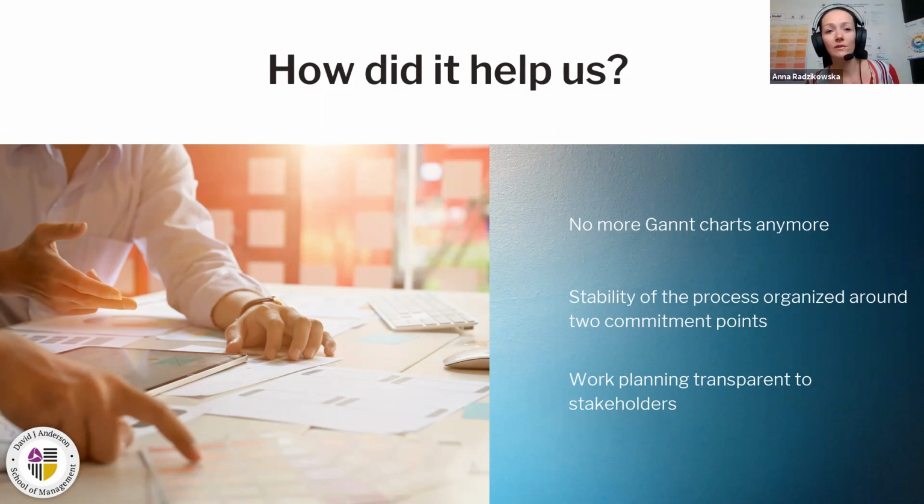For us, it was also difficult, not only because we had so many unusual circumstances at the beginning, but also because in our organization there was a deployment calendar. So we couldn't just deploy. We had a deployment window every second Saturday. And if we missed this deployment window, then we had to wait another 2 weeks.